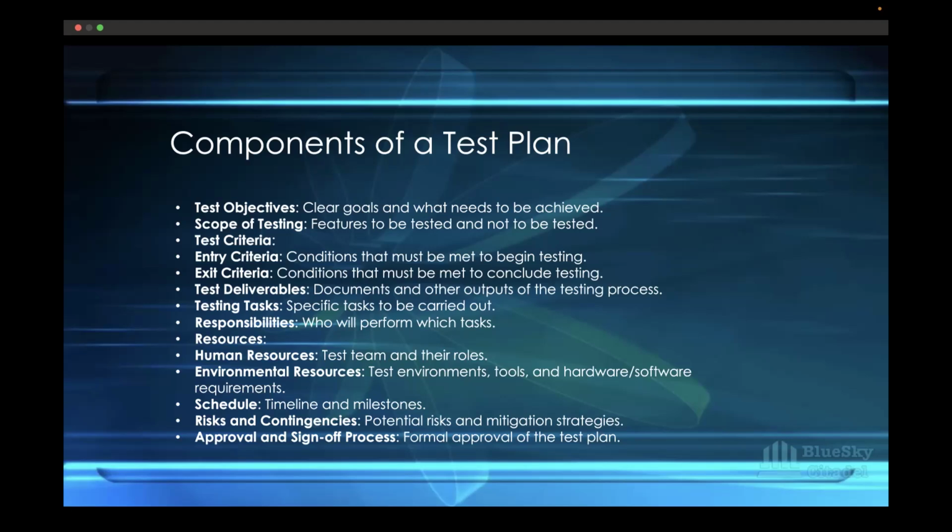You also have approval and sign-offs. So you need a formal approval of the test plan. This will come after you've documented your test plan. Either your test manager, your test lead, or whoever you report to will have to go through this test plan to ensure that everything you have stated meets what we need, and then they can approve and sign off.